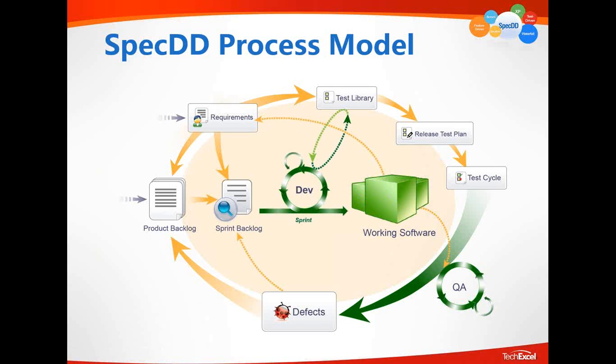For example, as the email announcement function I just described starts to behave, you forget that as you send the email announcement, another team member, another product manager, might open another browser looking at the email announcement. You need to improve the requirement to reflect that during this 30 minutes of data preparation time, it would be better to add a status showing it's preparing for sending.